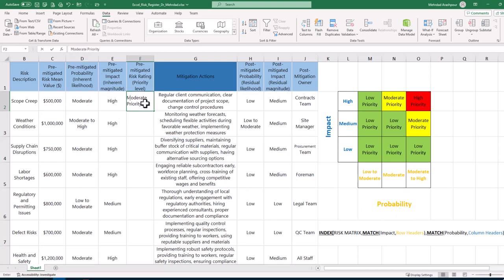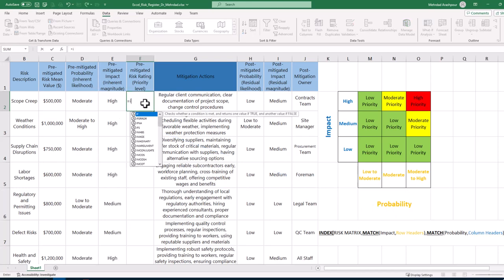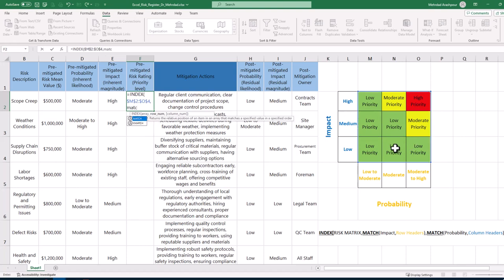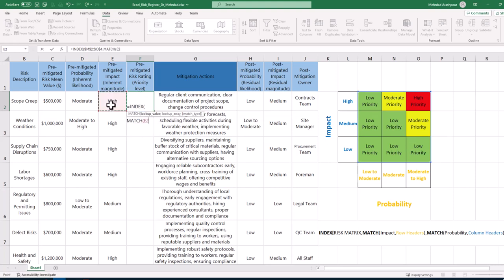To implement this in Excel, click on the pre-mitigated risk rating for risk 1 and press the equal sign. Then use the index function and make an absolute reference to the array of risk ratings in our risk matrix. We use the match function again to match the high impact of risk 1 with the row headers or impacts.